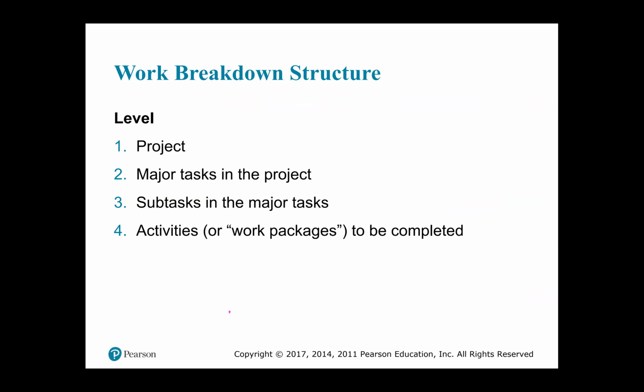So we need what is called the work breakdown structure. The work breakdown structure takes the project, identifies the major tasks in the project, identifies the subtasks in the major tasks, and the activities or the work packages in the tasks that need to be completed.